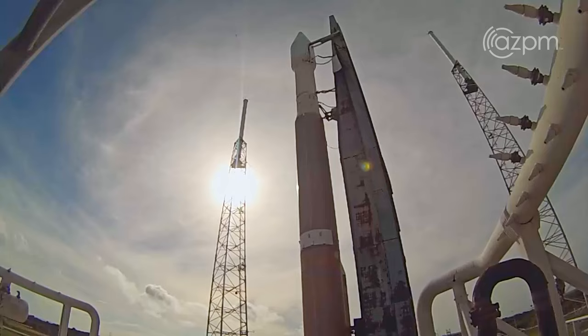They have a new schedule. They're going to show up late, but we've already looked at it. We're going to figure out how to get them into the flow. They're coming in November of 2015. They were supposed to come in July of 2015. So they're going to be there well after everybody else, but we'll be waiting for them. And they're going to have to play a little catch up in terms of the system level testing. But we've got a plan to do that, and we look good. We can get them on and get them out to the asteroid.